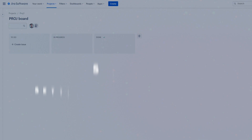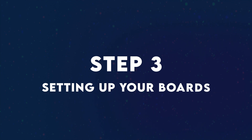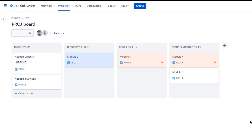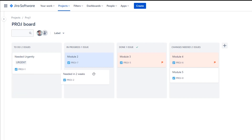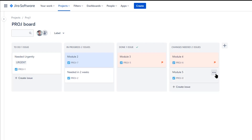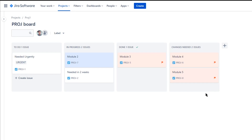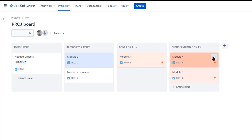For this tutorial, we are going to be choosing a Kanban team-managed project. Step three is going to be setting up your boards. This step is very similar to Trello, if you have experience with Trello. You will be creating boards, labeling them, adding, deleting, and rearranging the columns, all so that you can fit your workflow process.